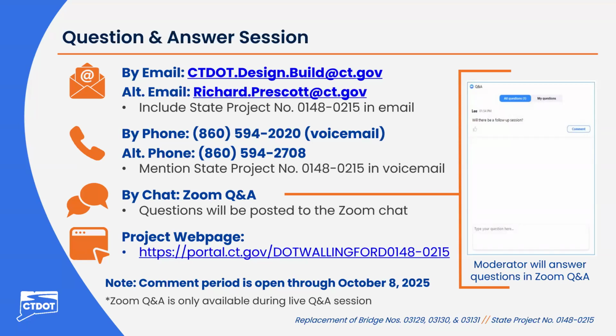Yeah, thank you for your question. Just to clarify, it is the northern long-eared bat, not the white-nosed bat. And currently, we are not anticipating there to be bats under the bridge. There will be qualified biologists going out in the field to confirm their presence. If they are there, we are conducting a programmatic consultation with the United States Fish and Wildlife Service. And they will provide us with what mitigation factors or tree clearing specifics to include within our contracts so that the design build contractor would follow those mitigation techniques. Thank you.